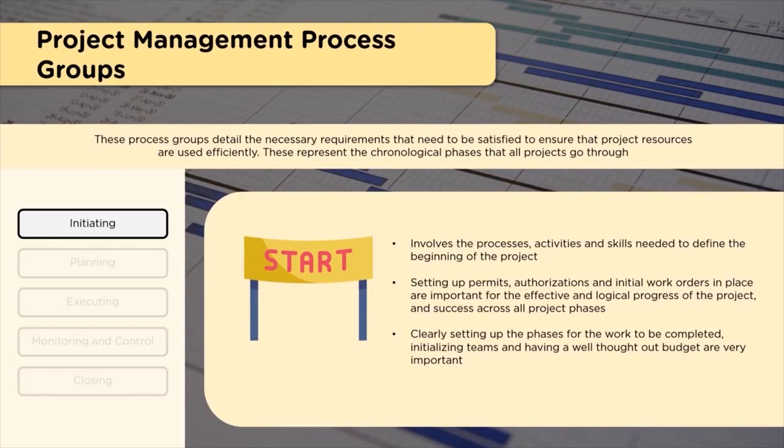And also one important thing we should keep in mind is in the initiation stage, appointment of the project manager happens. The formal declaration of appointment of the project manager happens and the project charter will be formally handed over to the project manager, and that formal declaration of assignment of the project manager happens. From then the project manager takes over, and the first activity the project manager does is identification of stakeholders.